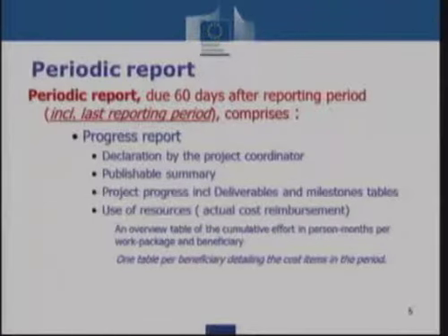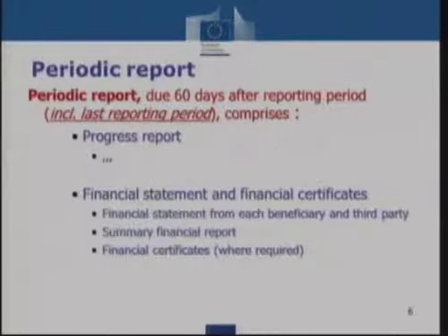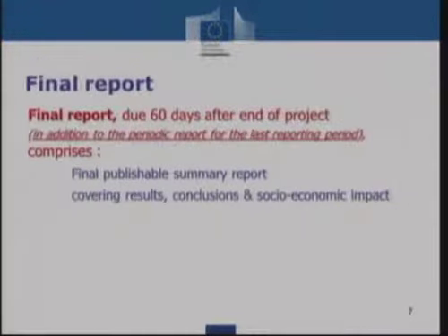We know that the effort to generate a use of resources table sometimes takes longer than the technical part of the progress report, where you simply have to report on what has been achieved. I know that detailing the person months and the costs is time consuming and takes most of your time. However, even if that's not available in a final version, we would like it to be available to the experts and to the project officer at the time of the review, because it's also something which is assessed in the review meeting.